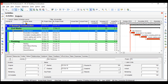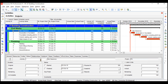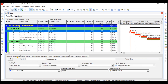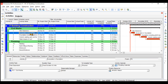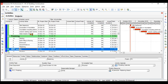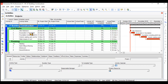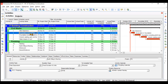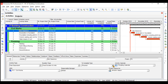Everything will depend on the type of activity and type of duration. In the General tab, most activities are Task Dependent and the duration type is Fixed Duration and Units. The percentage completion type is also Physical — meaning you will have to manually enter how much work has been completed and how much is remaining, since the percentage will not reflect the number of days. The calendar is also fixed for all activities and has not been changed.